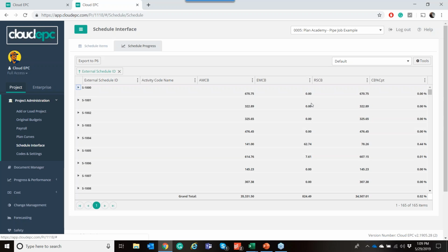Okay. Halasio asks again, what happens when your Excel units percent complete disagree with your P6 percent complete? I would argue if you're using it correctly through the schedule interface, Cloud EPC is your level 4, level 5 tracker, or your schedule tool is your level 4 tracker. And so it is what's updating Primavera. People are not updating Primavera directly in this world.